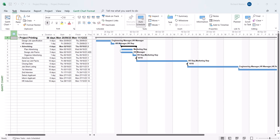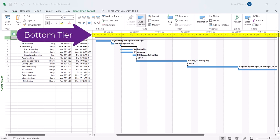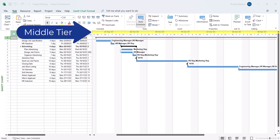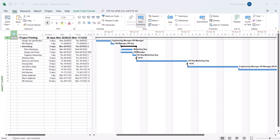There's two areas that we really need to look at managing when printing in Microsoft Project. The one is the timescale area, which is above the blue taskbars. It's where we can see the default timescale showing an M to an F. That's Monday to Friday. That's called the bottom tier and the week segments. That's called the middle tier. Project by default uses two tiers to print and that's the bottom tier and the middle tier.